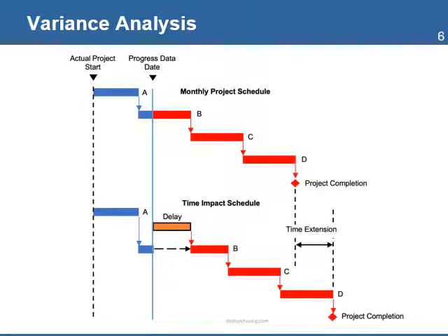Variance analysis is performed to determine the degree of change between the actual schedule and the baseline schedule. The purpose is to identify variations. These can result from differences between the actual duration dates with the original estimates. As the project team makes progress, more and more data will be collected that shows the variances. The actual time needs to be entered in the scheduling system to help monitor the variances.